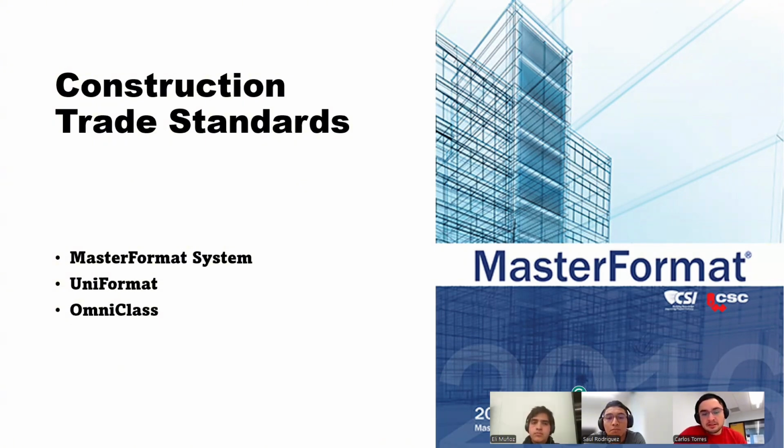It organizes construction specifications using 50 primary divisions. It facilitates information organization during the construction phases. It ranges from procurement and contracting requirements to specific trades like concrete and masonry, and it's further subdivided into sections detailing specific materials and work.